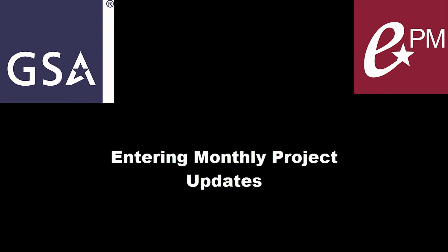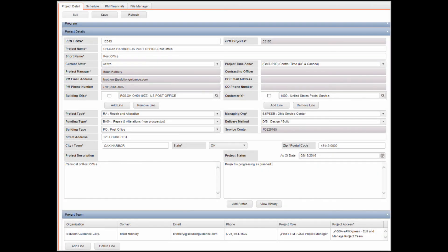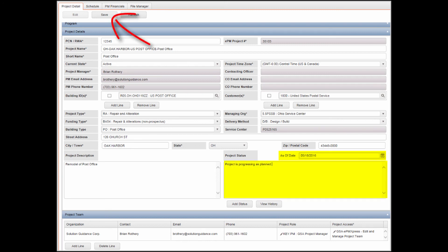Entering Monthly Project Updates. The first requirement is Project Status. To record a new project status, navigate to the Project Details tab and click Edit in the toolbar. Click the Add Status button below the Project Status field. Populate the As of Date field and the Project Status Memo field, then click Save in the toolbar. To review the project status history, click View History below the Project Status field.